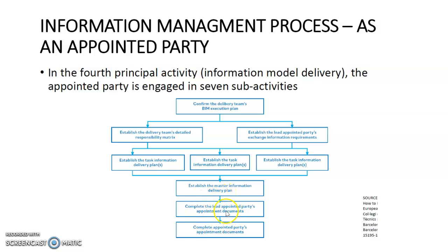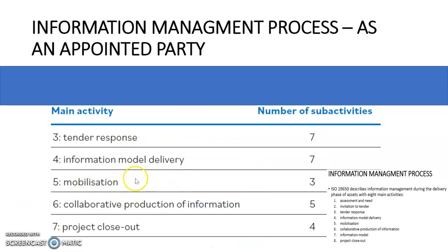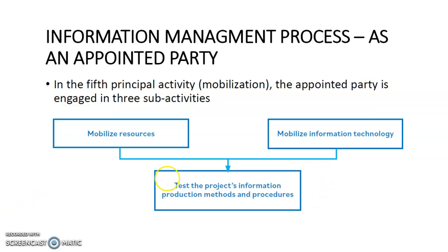Then complete the lead appointed party's appointment documents, and complete the appointed party's appointment documents. During the mobilization stage, or the start of the construction work stage, the appointed parties will have 3 responsibilities to undertake. Let's take a look at these 3 responsibilities. They will need to mobilize the resources as well as the related information technology associated with the resources, and to test the project's information production methods and procedures.